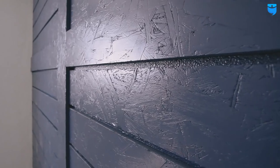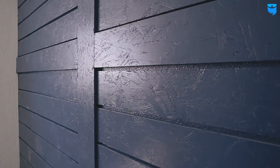For the people below, we're thinking about the tenant who's going to live here, and how we're going to get the rents that we're asking. So we upgraded the flooring, and then we did an accent wall in every single bedroom. Shiplap's really in right now, with everyone watching HGTV and those shows that everyone loves. So we did our own version of shiplap. This is actually plywood that we cut into strips and put on there to look like shiplap and painted it. By doing that, we saved $100 a unit.